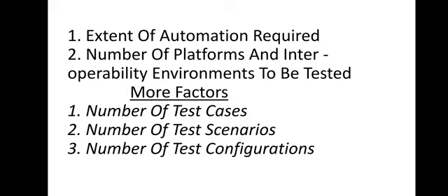You can see here in the next slide, extent of automation required. That means when automation is involved, the size of work to be done for testing will increase. You can also consider the second point, number of platforms and interoperability environments to be tested. That means this is again a factor that is going to influence the size or estimation.